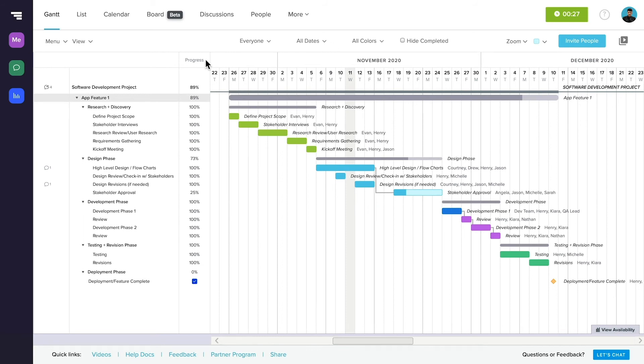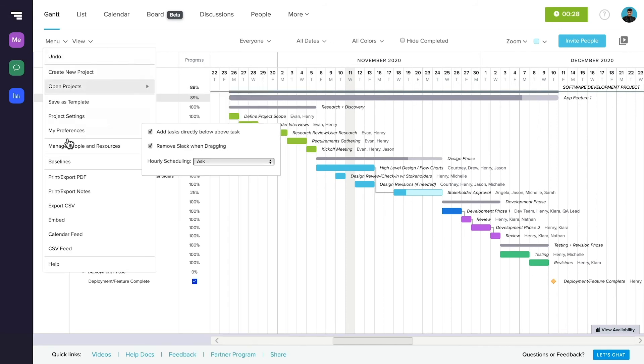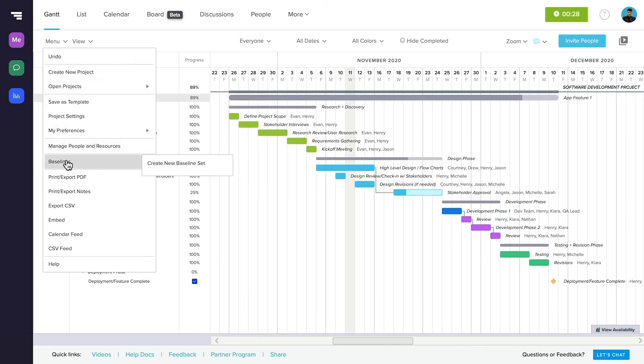Baselines are simply a snapshot of how your project looks at a given time. You can create them by clicking in Menu from Gantt View, and then Baselines, and finally, Create Baseline Set.